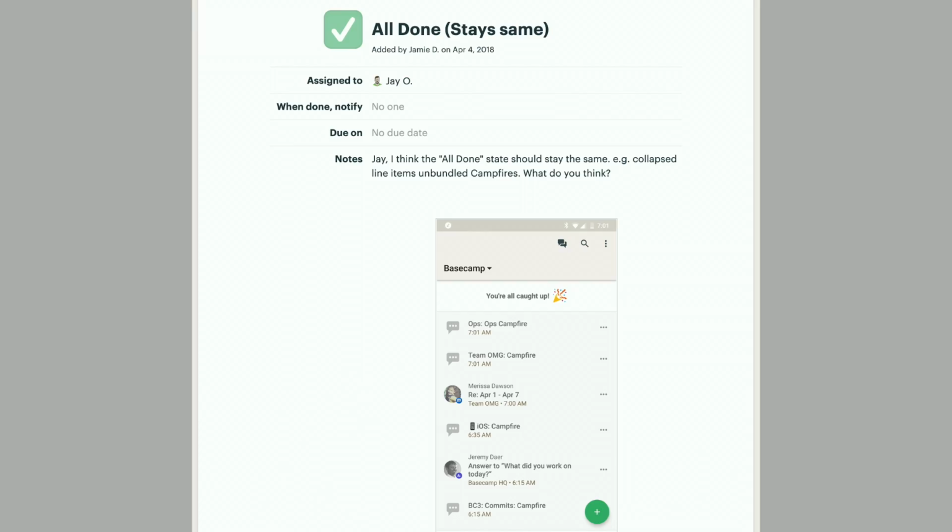We also have a concept called scope hammer, which is basically things that would be awesome to do, but they endanger us shipping the product within 2 weeks. That's really important because we don't want to languish and have this thing caught up in endless design, endless development. We focus very much. Our budget is the time. It's not the ideal, not the full ideal product that we'd like to ship, knowing that we can continue to revise and iterate later.